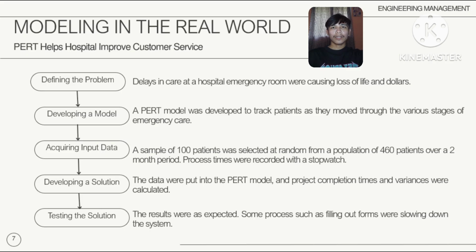Fourth is developing and testing the solution. The calculation uses these three time estimates. The PERT formulas were used to calculate the expected time for every activity in the ER process, and forward and backward passes were performed on the entire network.